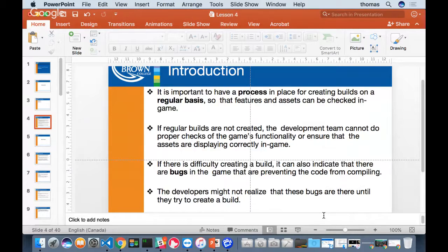It's close. I want actually a start screen, for sure, some kind of start screen. I definitely want one full level. It doesn't have to be 2 levels. One full level that's functional, right? That has full interaction, that has full animation. Most of your assets should be available at this point in your alpha release, right? So your sounds, if you have some kind of background music or whatever, all that stuff's going to be available. Your UI for your first level should be functional, and then an end screen. Those are the 3 things I want.